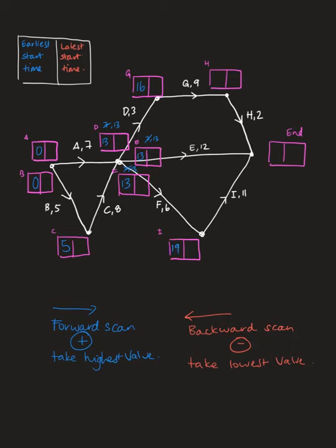All right. And then if we carry along here, the 16 plus the 9 to start activity H is 25. So 16 plus the 9 is 25. It's my only option. And now to get to the finish, I can have 25 plus 2, which is 27.